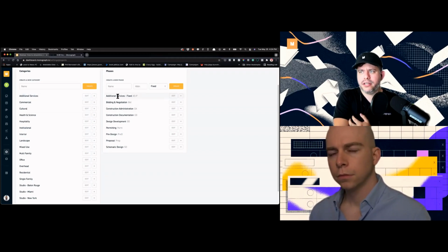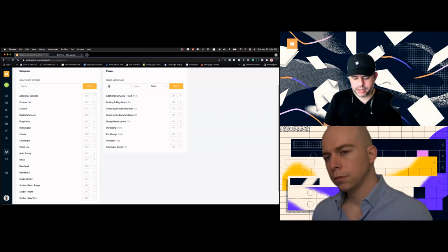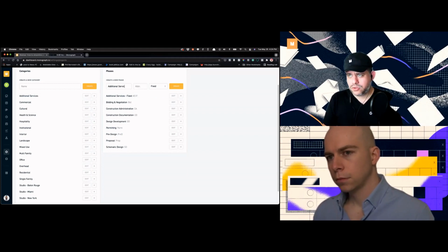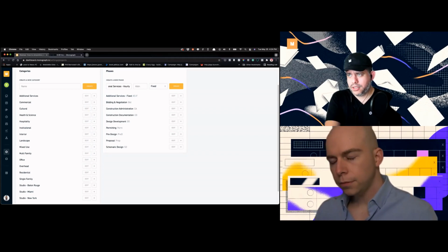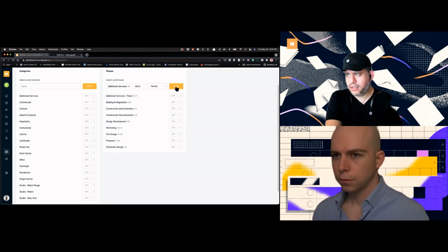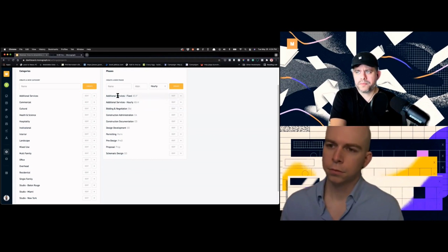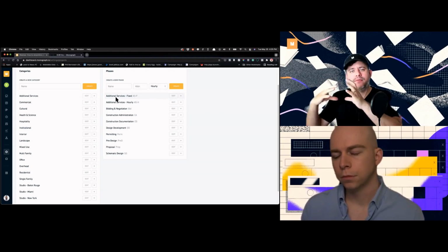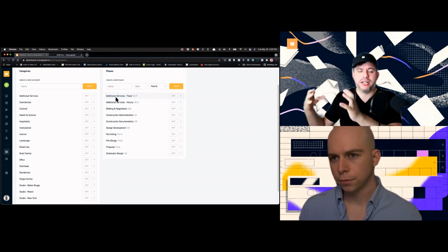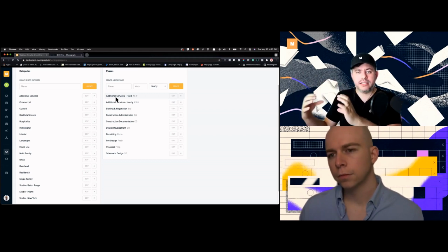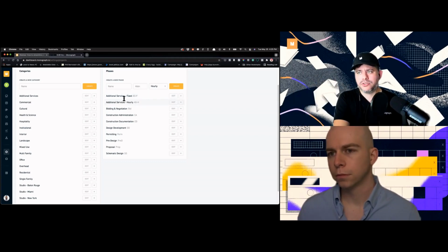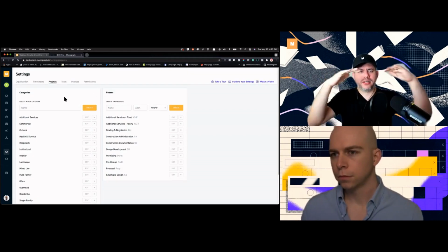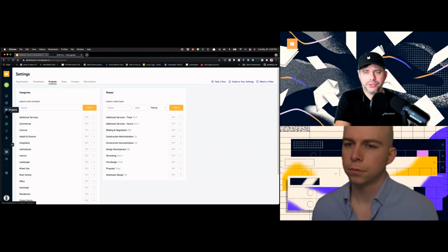The only thing that's new here would be additional services as its own category. We also have it as a phase here for fixed, but I can come in here and say additional services, hourly, give it an abbreviation, and say this one's hourly, just so that I know. Now I have a phase type that I can create on a project and have time allocated, maybe not budgeted necessarily, but as a placeholder, so we can put time against that and track it.